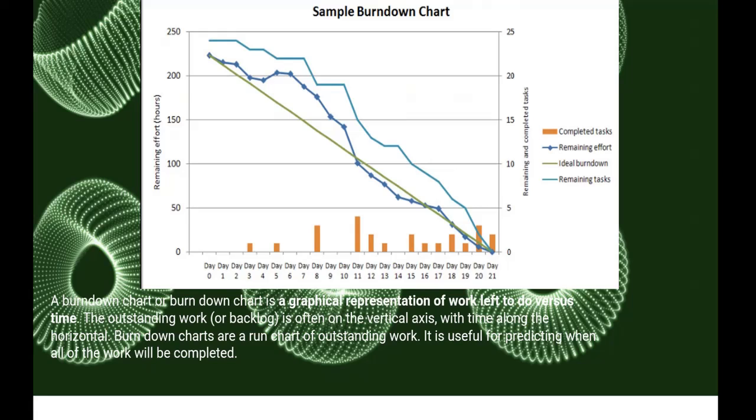There are different kinds of standard, like one process called t-shirt method. T-shirt method means like we have small, medium, large, extra large. So for example, if the task needs more types of work, they can put it in the extra large size. If it is less, they need less attention, it will be the small size. And based on that, they have some types of point, and they calculate the point using Fibonacci chart, Fibonacci number.